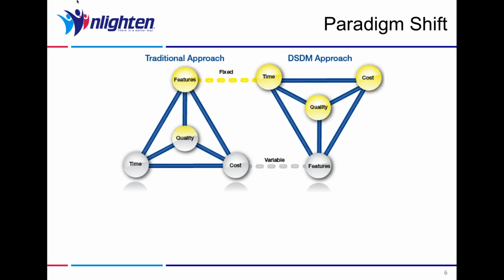We have roles in DSDM like the business visionary and the business ambassador who are responsible for driving the project at two different levels of detail. Business visionary at the strategic level, the business ambassador at the day-to-day detailed level, guiding the solution. Within Scrum, we have our product owner who fulfills both of those roles and provides guidance to the team.